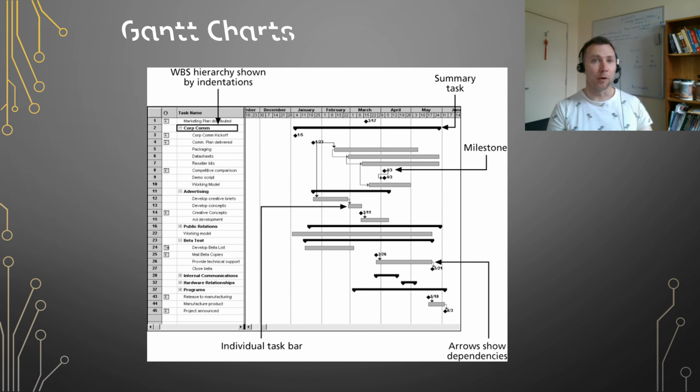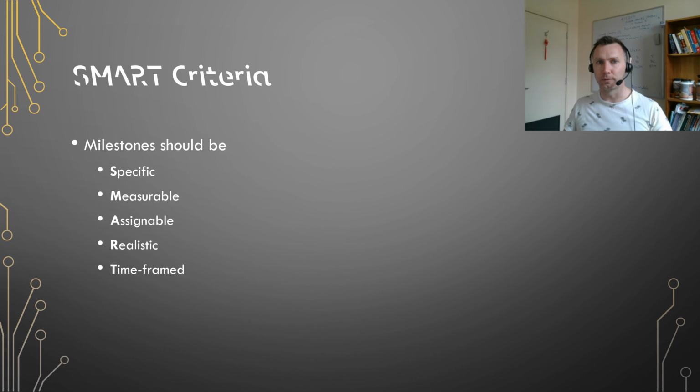Many people like to focus on meeting milestones, especially for large projects, because milestones emphasize important events or accomplishments on projects. We'll normally create milestones by entering a task with a 0 duration, or you can mark any task as a milestone. Remember that your milestones should be SMART: specific, measurable, assignable, realistic, and time-framed.